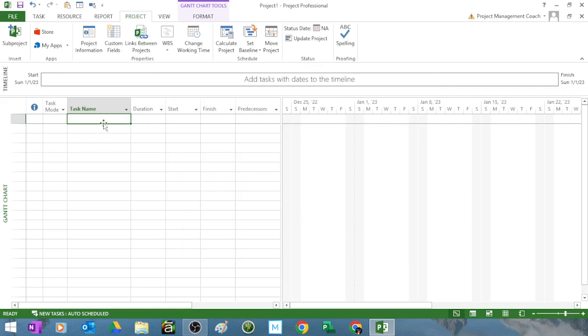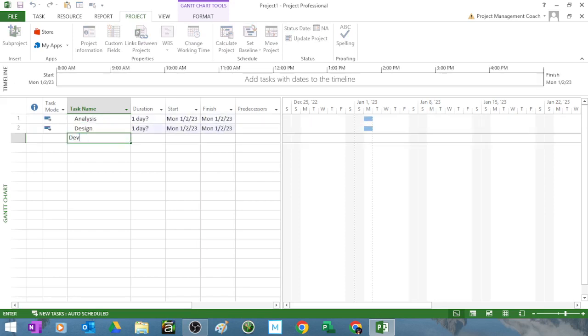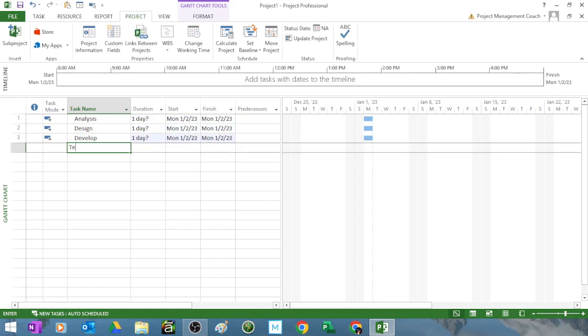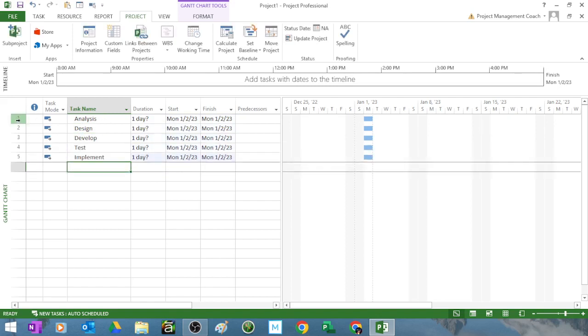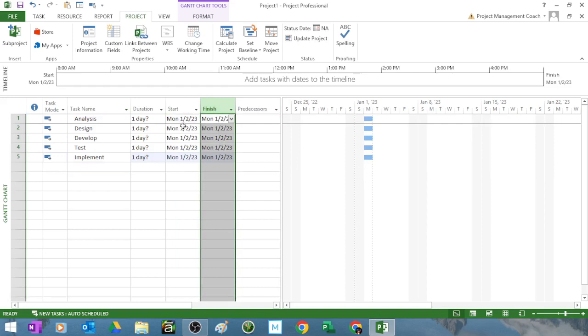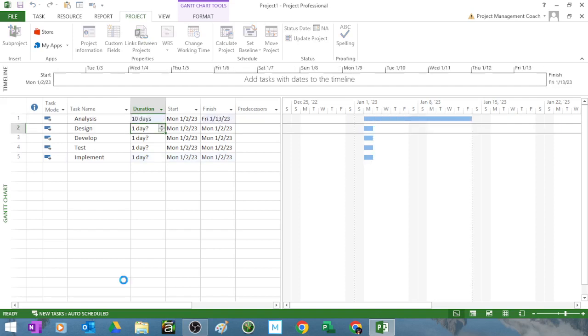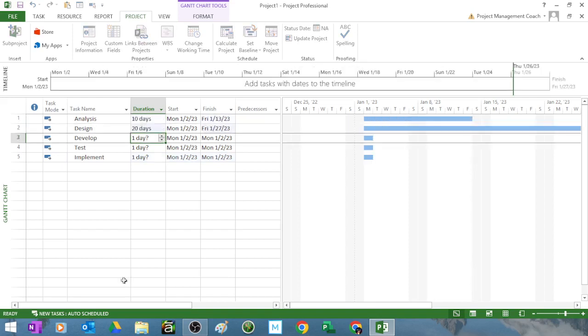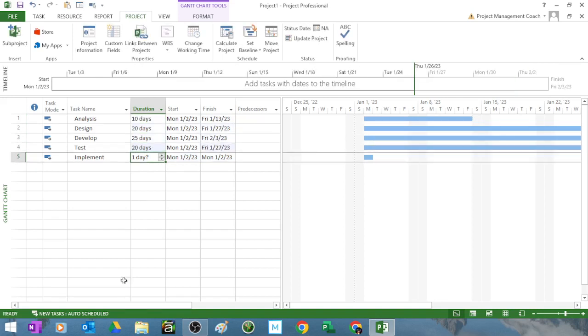Now the next thing you do, we type in our tasks. So let's type in our high-level tasks of analysis, design, develop, test, and implement. This is how you put tasks into MS Project. You do not type dates in forcibly unless you truly have a constraint. The next thing you do is you assign durations. So let's go ahead and assign some durations.